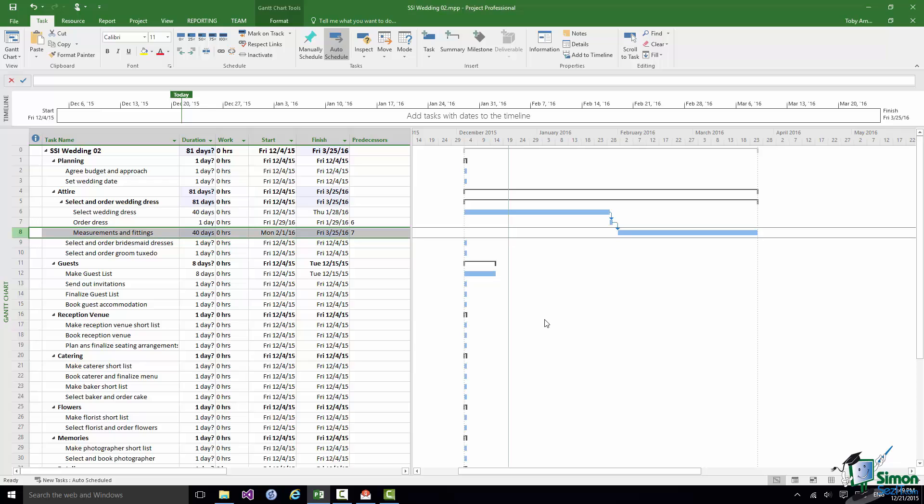Now let's move on to Task 9, Select and Order Bridesmaid Dresses. Now this is not a task which is completely independent of the wedding dress because as I understand it in general the wedding dress would be selected first with a thought to what the bridesmaid dresses will be like. But you certainly wouldn't start selecting the bridesmaid dresses until you were certain about the wedding dress.